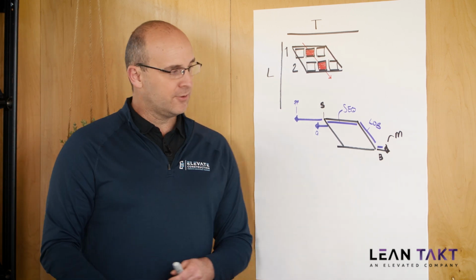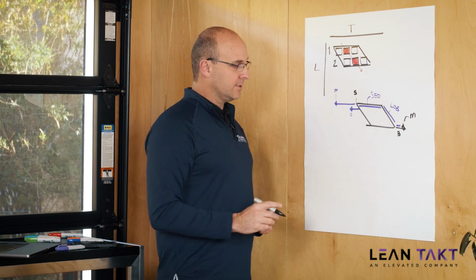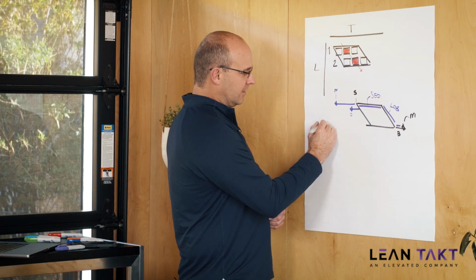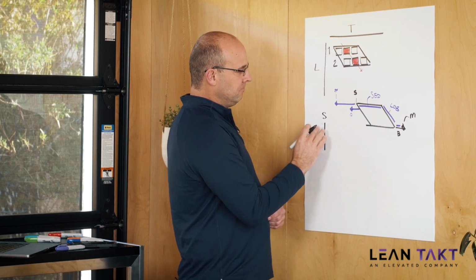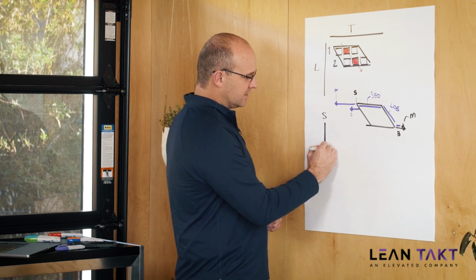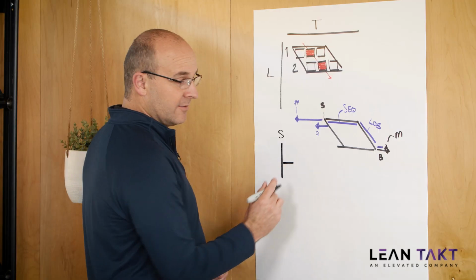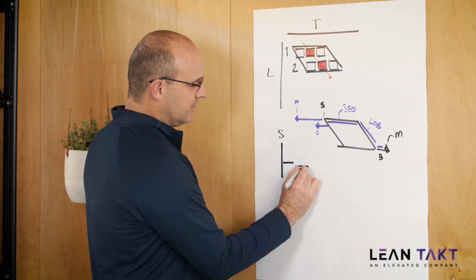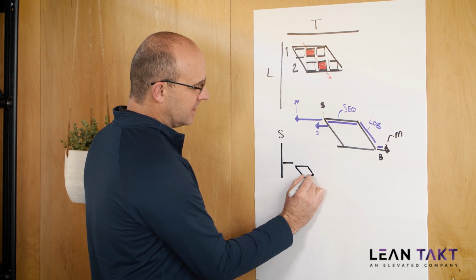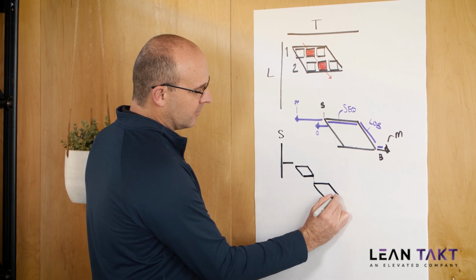Now, when we create takt plans, what we'll typically do is research the drawings and say, okay, if this is my start date for the project, this is when design will be done, this is when we'll have a notice to proceed. I've talked about this in other videos, I will start mapping out and sketching out what the actual structure of the takt plan will look like.